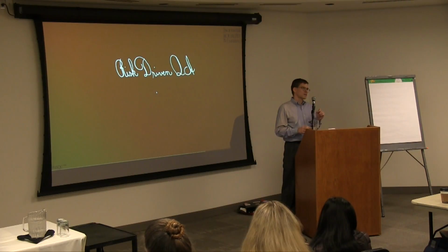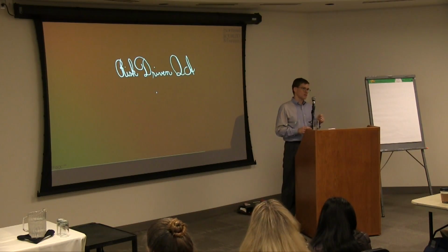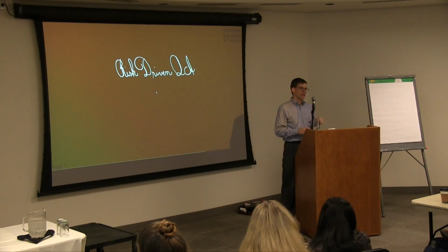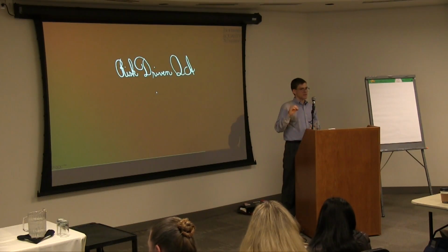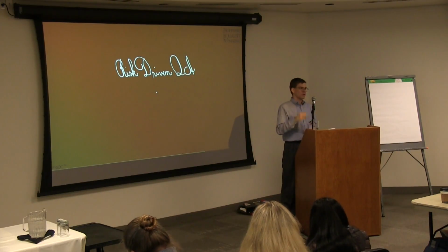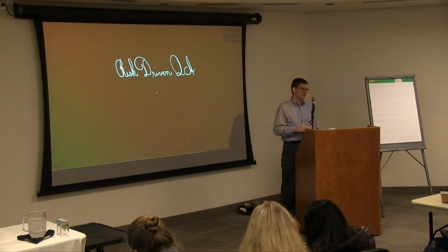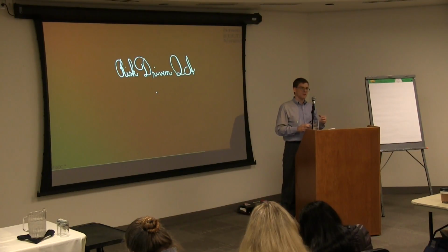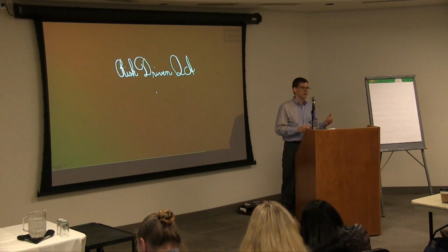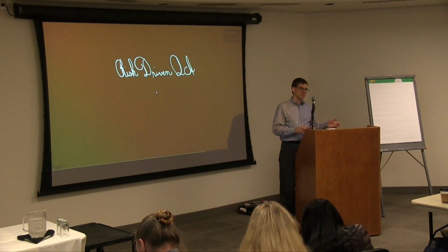So once we determined what the overall risk assessment to the customer was for a particular issue, those risk assessments were then mapped specifically to engagement protocols for the team. For a ticket that was deemed to be of low customer risk, QA's engagement was 0. We committed to no additional effort on that ticket. For a risk assessment of medium, QA was then responsible for manually validating that a bug has been fixed, or a feature has been correctly implemented on one or more applicable operating systems.